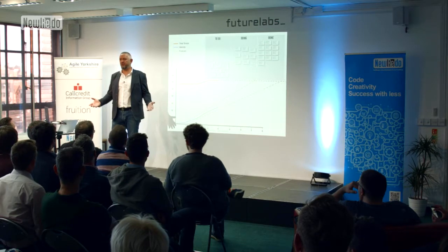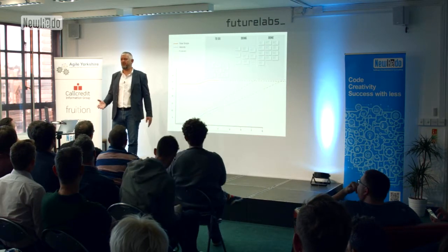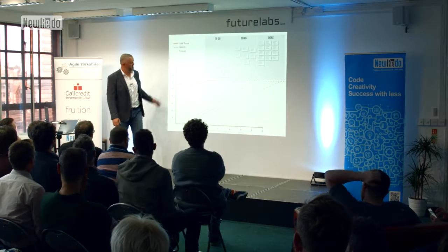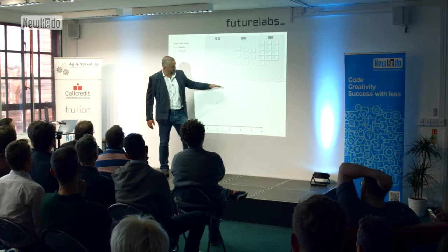What I observe a lot of teams do is use burn down charts when they've got a short period of time. So you've got X scope, how we're doing each day, burning down to a particular goal. That's very short term. I think there are a few issues with the way people do burn down charts as well. Particularly when you see things like TeamCity or Jira, a lot of the default templates ask people to give an estimate every day of how much time they've got left. That's such a flawed concept because they're always 95% complete all the way through, and what you see in a burn down chart is it goes horizontal and then right at the last day, it all suddenly comes in.